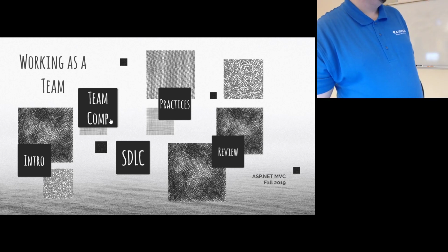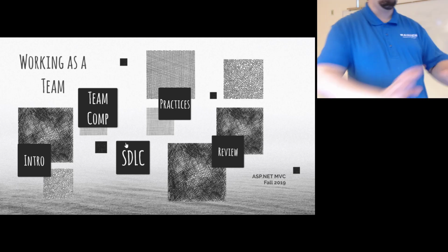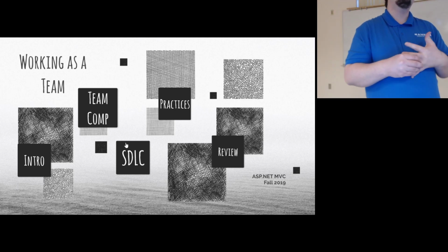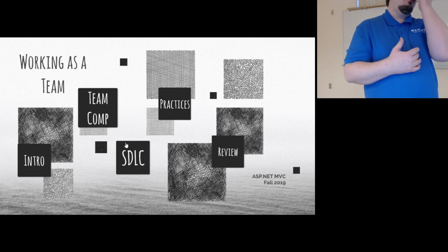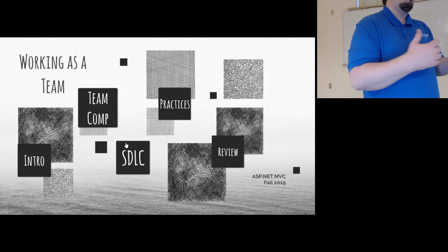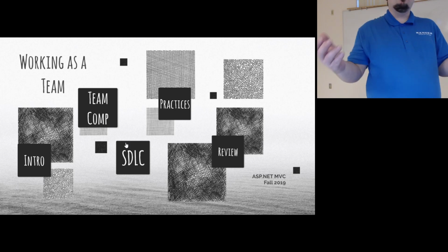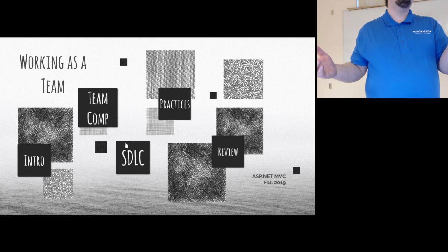All right. So we talked a bit about the different business areas, the different functions, and how we interact with that. We talked a little bit about how teams are made up. Can anybody tell me what I said the normal team size is? 4 to 6 people, right? Of those, how does that break out normally? You've got a business analyst, 2 to 4 developers, and 1 or 2 QAs.